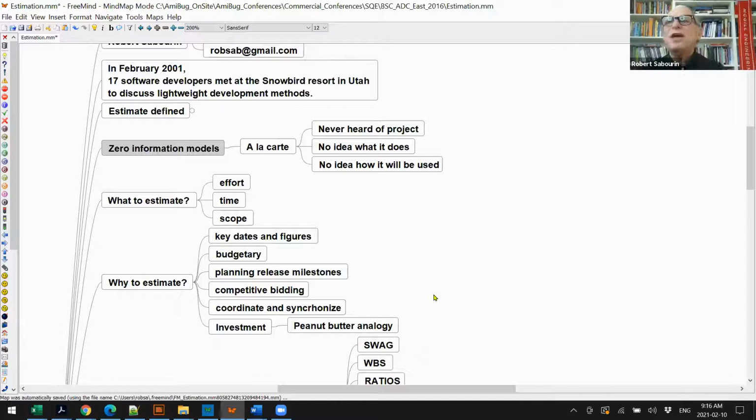And you have past projects, so they can say, aha, FISBIN is similar to the project called Romulan that we did 8 months ago. Oh, okay. If it's similar to Romulan, then you can check your collection of past data that you've collected. If you follow my methods, you have a little bit of data. And you'll say, well, when we did Romulan, that project took us 8 person-months to test, in 3 months elapsed. And when we shipped the product, we had 15 bugs we had to fix within the first month. So probably we should have tested it a bit more than we did. Now you've given your stakeholder not an estimate on what it takes to do FISBIN, but a reality check on what happened the last time you did a project like FISBIN.